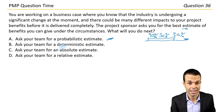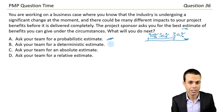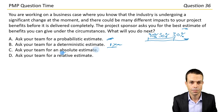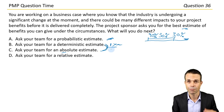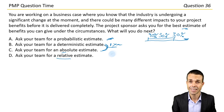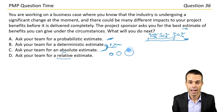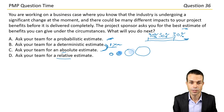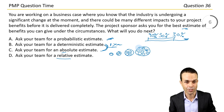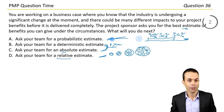Option B: Ask your team for a deterministic estimate — that's a specific number. No for now. Option C: Ask your team for an absolute estimate — maybe similar to deterministic; both sound very absolute and our environment is changing. Option D: Ask your team for a relative estimate — that's more agile-related, where we look at the smallest piece and estimate everything else relative to it, using Fibonacci numbers and similar. That's not what we're after here. We're going with answer A — the probabilistic estimate.